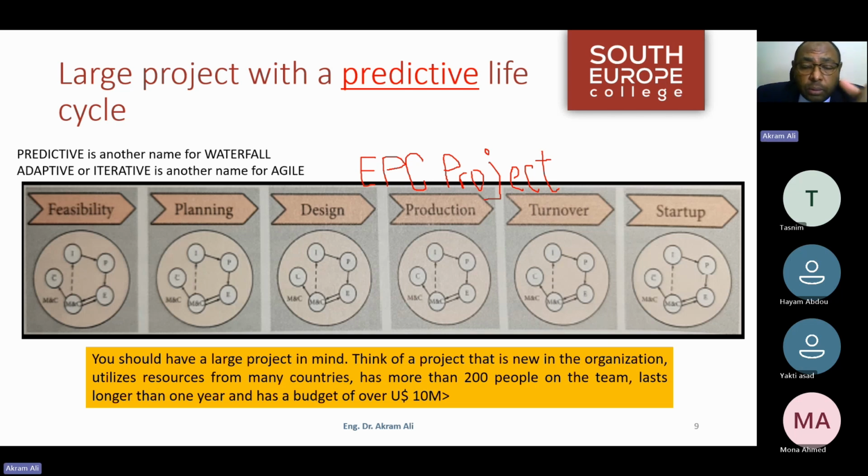Also, during my project management, as a project manager, it is always very important to have look aheads for my next week, for my next 2 weeks, and for my next 4 weeks. And if I am in a country that faces huge supply chain issues, then I must have like a 3 month or 6 month look ahead, depending on the life cycle of supply chain, which is common in such a place. I have to investigate and make sure of the availability of materials and resources for what's going to happen next week.